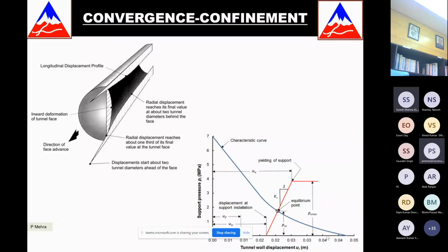So that is why, if we do not know the geology very well, then working with tunnel boring machines in the hills becomes cumbersome. But if we know geology well and there is a finite continuous geology, in that kind of a condition, we can ensure that TBMs can also work. And we should not close our minds to TBMs in the Himalayas anymore. But then we should try and get them in at the DPR stage. We should communicate with the industry, ask the TBM manufacturers what kind of TBMs are available, and ensure that kind of an input is made available to them so that they can help us use the TBMs.